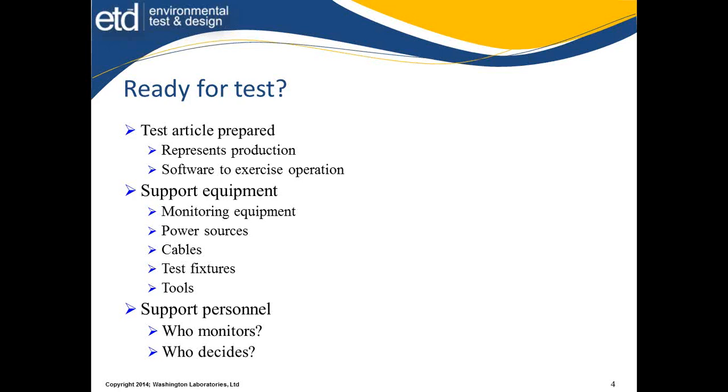I got a shipment in about a week and a half ago for 3 items to be tested, and not one cable came with the package. Good instructions on setting it up, but they didn't send any cables, so we're waiting on those to arrive. The whole test program just got delayed by an inordinate amount of time. They figured, what's cables? And I don't know what they were thinking as to who's going to make them, who's going to provide them, and who's doing the wiring.